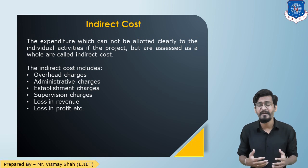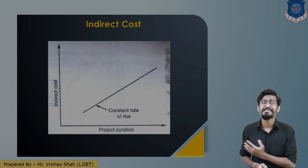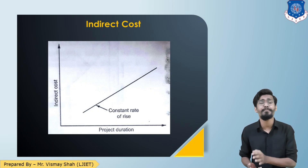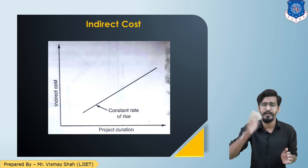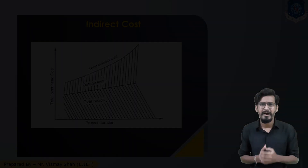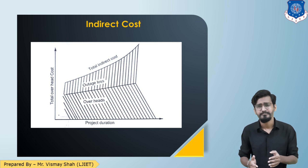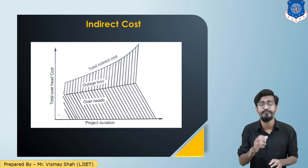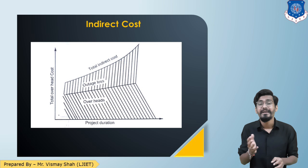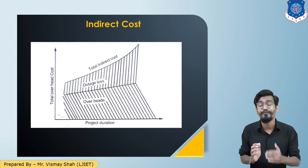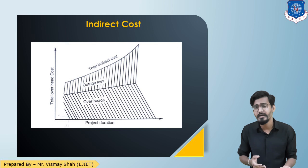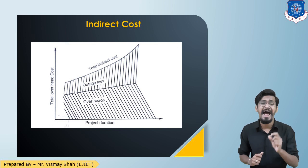The indirect cost is linearly proportional to the duration — as the project duration increases, the indirect cost will increase. When there is loss in profit due to inability to meet demand or a contractor suffers a penalty, that is a loss in profit. For example, if you were going to earn 5 lakh rupees but instead earn only 3 lakh rupees, your profit is reduced by 2 lakhs. That reduction due to penalty is known as outage loss.